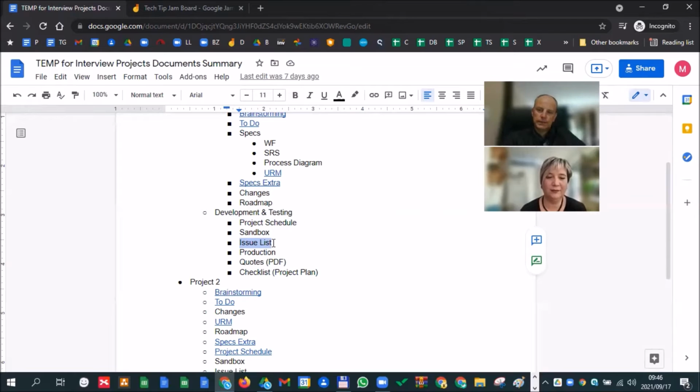So what happens is you do a small sprint and you put it out there for the testers and the clients to test. Now, obviously, you're going to record issues. Issues isn't necessarily a bad thing, because it's actually a good thing when you find issues, because you want to find them before your customers and your clients find them. So we actually use the same system we're using for project scheduling to keep track of the issues.